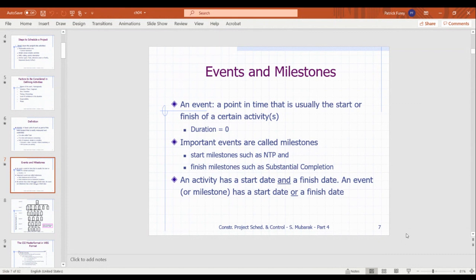There's other forms of occupancy, I'll call it. For a town or a village to allow somebody to move into a recently constructed or renovated space, they issue a certificate of occupancy, and that's going to tell the owner, you can start moving people in, but you still got to finish and tie up these couple things. That's a pretty important document that you need from the village or town, and if they're still concerned about anything, they won't issue it, and that might not allow an owner to move 80 employees out of the building that we're leaving and into the new space, or something like that. Then they got to readjust all their plans, all that kind of stuff. So